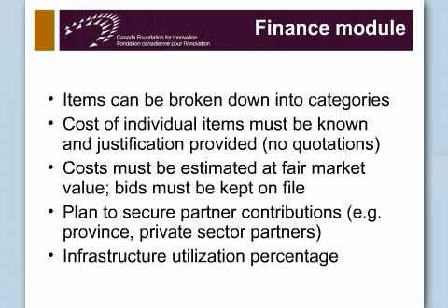When you write your application, you are allowed to include some contingency in those prices, a cushion that allows you to think ahead if you're going to buy something in 2 years, for the increase of cost of living. So inflation, you can factor that in. You have your bid on file, but you can add an extra cushion, knowing that you will have to update this in the future and the prices might change.